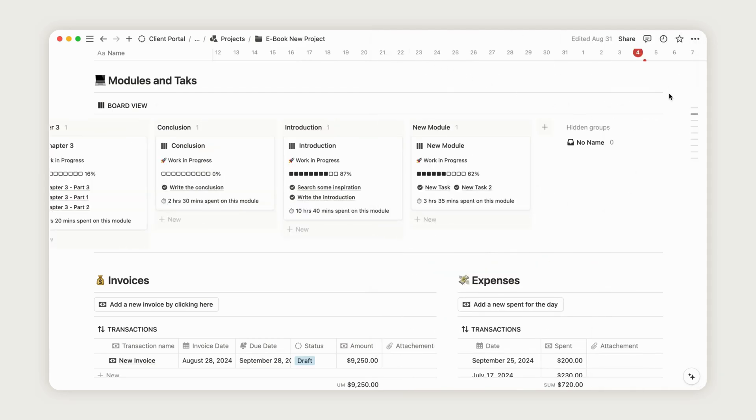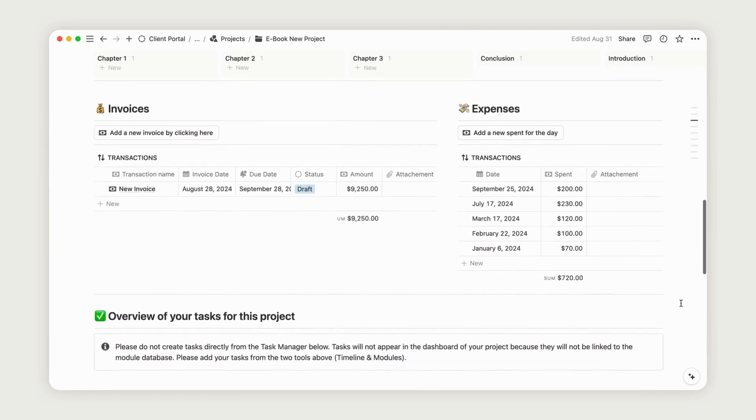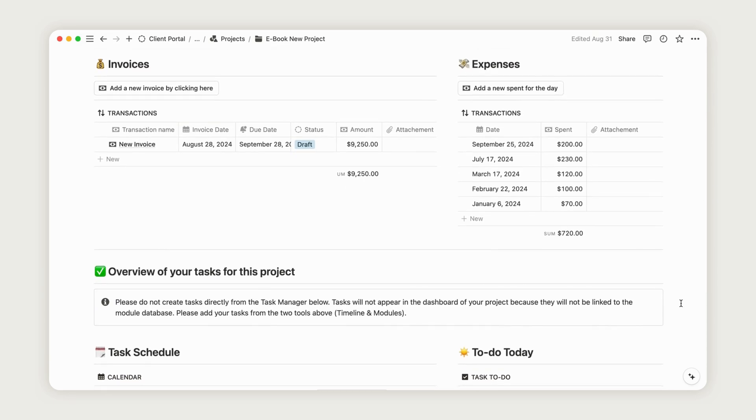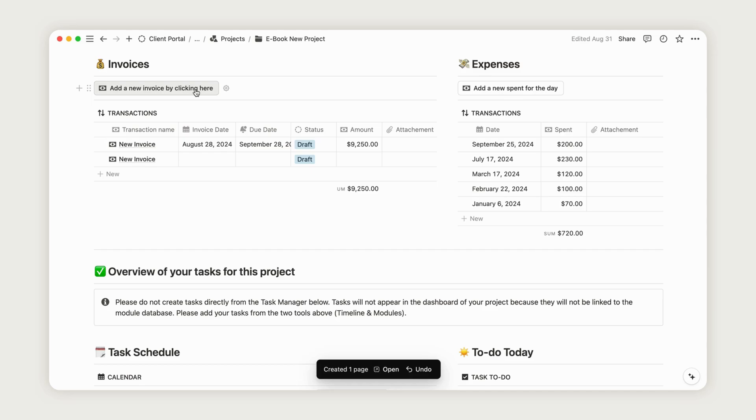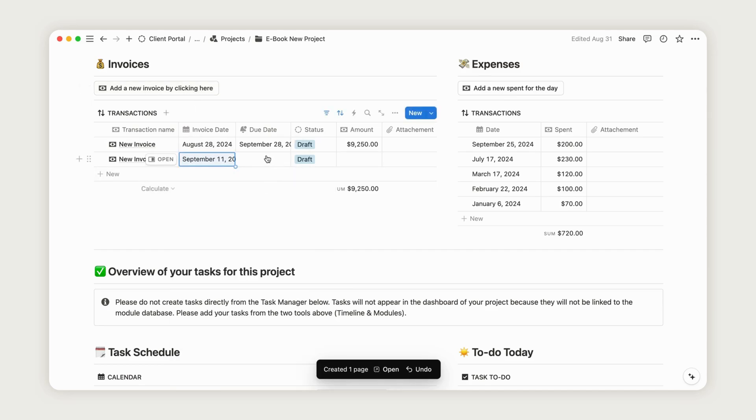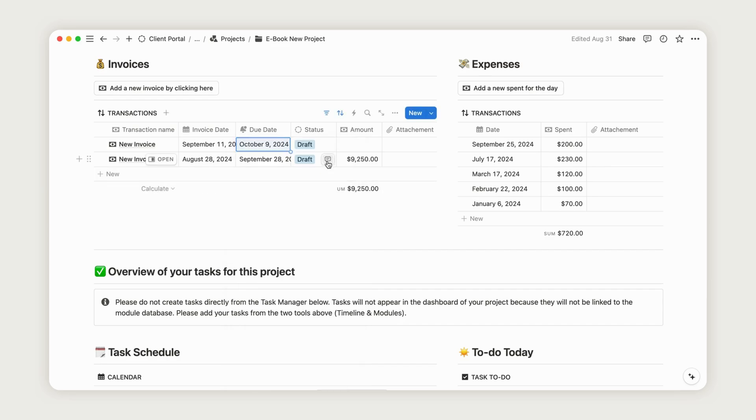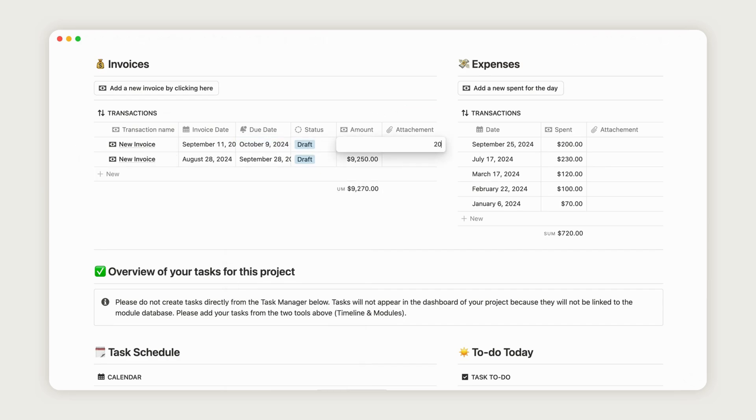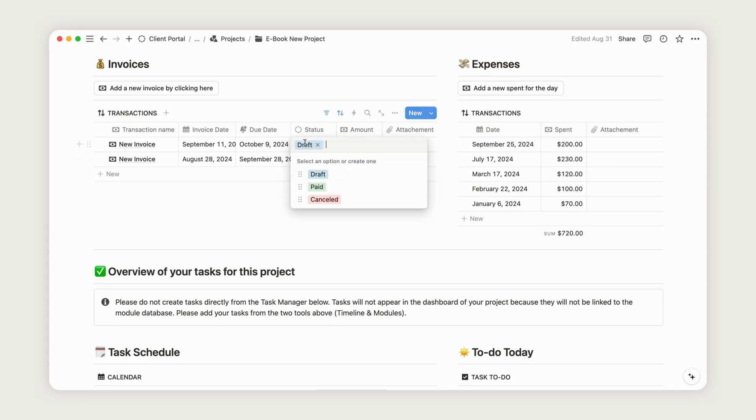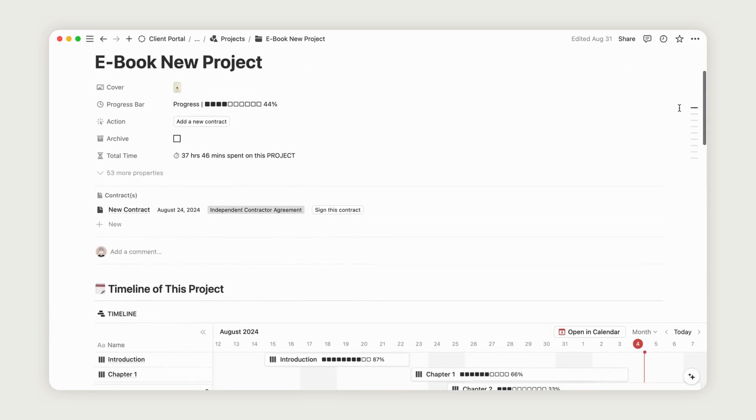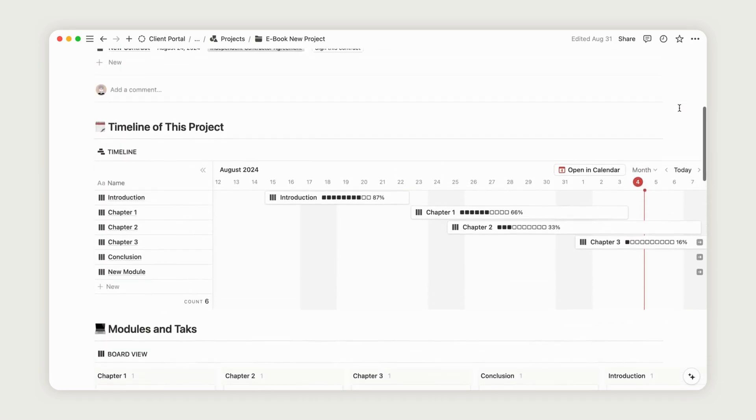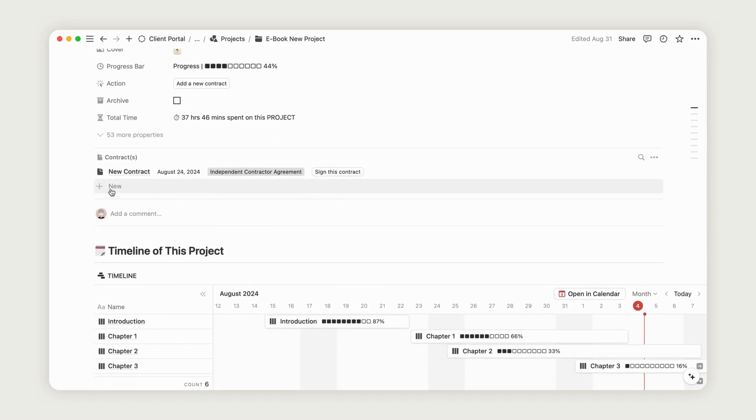Each project dashboard also includes an invoices and expenses section, where you can manage all transactions related to the client's project. To add an invoice, click the corresponding button, select the date, enter the amount, and choose the appropriate category for organization. Once everything is set, update the invoice status from Draft to Paid. Only paid transactions will be counted. The expenses database functions similarly. You can monitor updates directly from the dashboard, where reports on received and cancelled invoices will be displayed. You can also easily add a contract by clicking here. We will cover the Payments and Contracts section in more detail later.